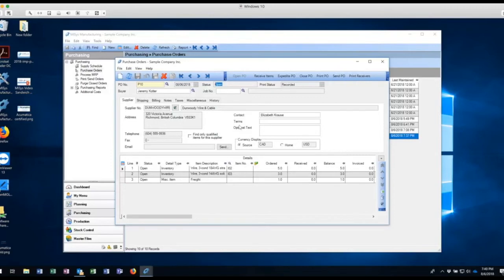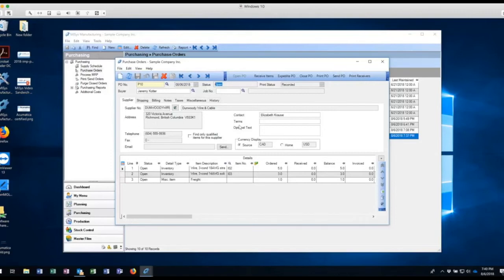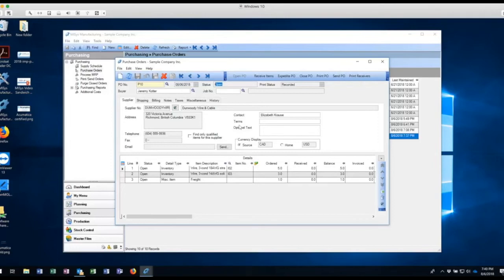Now I send it off to the vendor, the vendor looks at it and goes, Hey, yeah, I can't deliver on Sundays because one of them was on the 12th and the 12th is on a Sunday. So, we can do it, but we can do it for the following Thursday, the 16th. So what I want to do is when I get that information back from the vendor, I want to update my system because I want to be able to give my receiving team a daily dashboard that shows them everything that's supposed to be coming in today. And so if I've got my dates up to date, then they will show up properly on there.